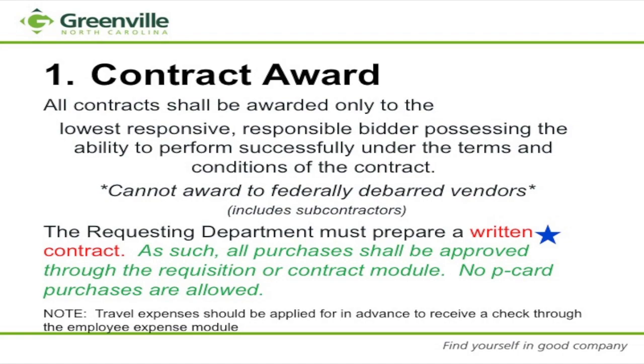Okay? Yes, sir. I guess just due to staffing constraints, we jointly develop our contracts with whoever the selected consultant is. Most of ours are service contracts as opposed to construction contracts. That doesn't necessarily contradict that, correct? It does not. Provide all the language that we require as part of that, but most of the time we have the consultant draft the actual contract itself and then submit it for review through our channel. Absolutely. So that's still allowed. Perfectly fine. As long as the appropriate contract provisions and the appropriate language are included, that's perfectly fine.